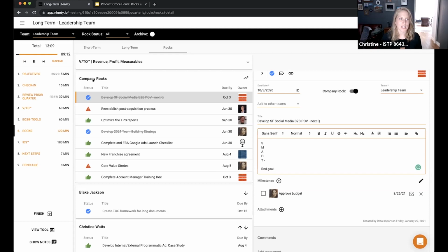So I did just see Aaron's question too of the difference between milestones and to-dos. So you still have your running to-do list during the meeting, you're creating them from issues, they're coming up in your weekly level 10s. Your milestones are just the things that you're setting up. They're almost like your subtasks, your to-dos that are attached to that rock, because you're saying throughout the quarter, here's the individual things that I'm going to get done in order to get this done.